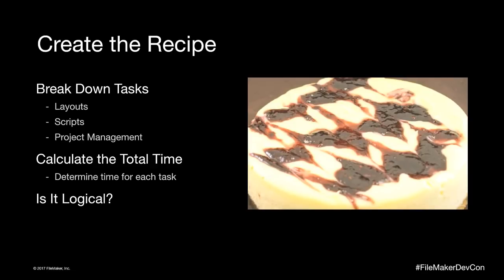So I always add more time for QA, and I just say, well, for every 5 hours of programming, I'm going to add another hour of QA. So when I say I'm going to take an hour to do a script, that's including testing it, but on top of that, I have an additional bit of QA. So basically, you add it all up, you come up with your time, and always have a little bit of a buffer. Again, it's up to you. It could be 5%, 10%, 15%, whatever. Have a little bit of a buffer, and then I add it all up.